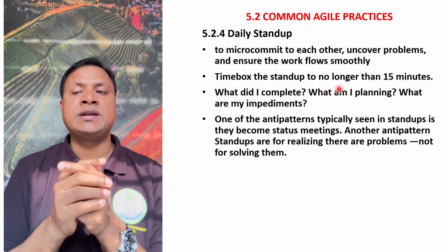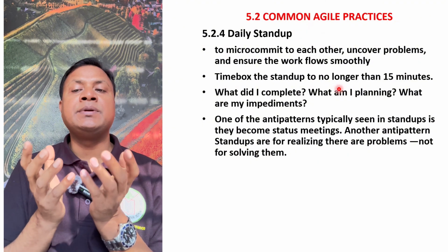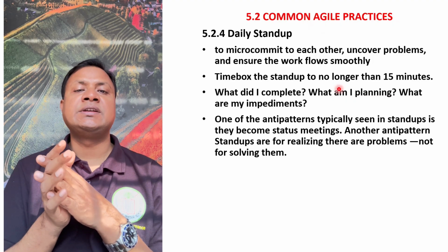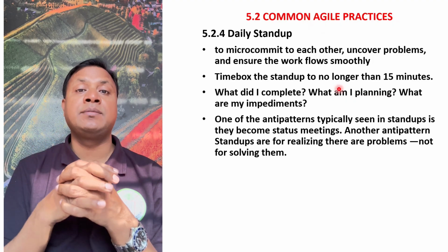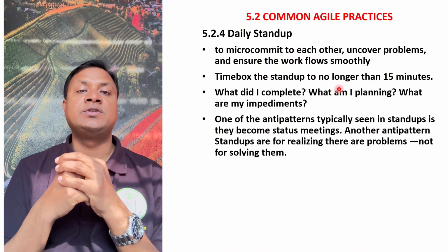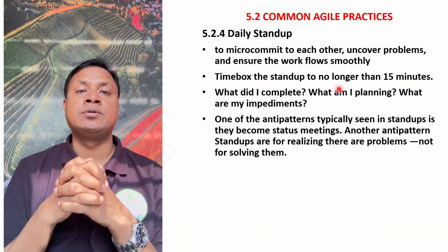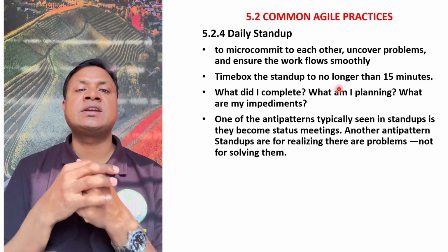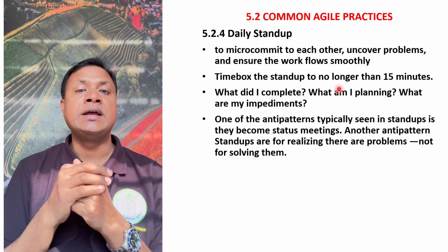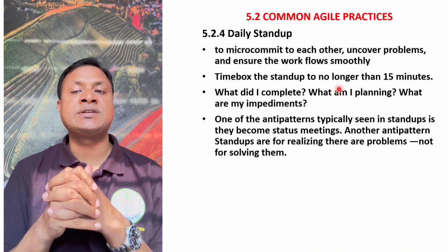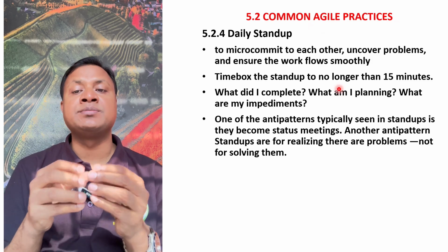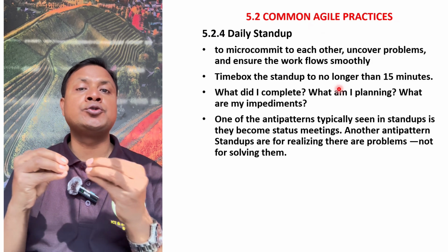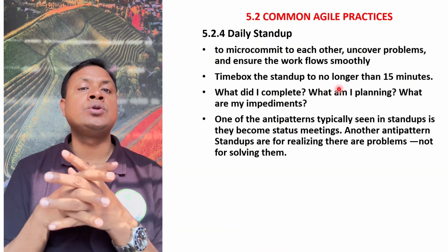One of the anti-patterns typically seen in the stand-up is that it becomes a status meeting. People just come and go, treating it as a status meeting, where I am the organizer and they are the participants of this meeting. This is called a status meeting. No fruitful achievement there. Another anti-pattern is stand-ups used for realizing there are problems but not for solving them. Everyone comes and expresses their problems only. No solutions are there.